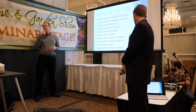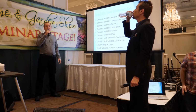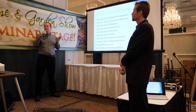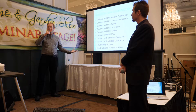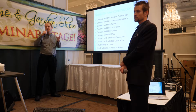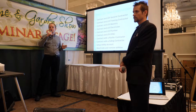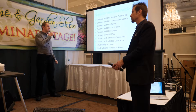Yeah, and sometimes what you'll run into with utilities, especially if you're doing this in the winter months, and we actually ran into this, where ComEd was supposed to come and connect the electricity at a house, and that big storm that came in November hit right on the week that they were going to come and hook up the electric at a job site. Well, they said, too bad, we're coming in 2 weeks now, because of how many people lost power, so their focus became getting everyone connected with electricity. So sometimes the weather will affect that timeline, so you want to get all that set up as quick as possible, because it usually takes them 2 to 4 weeks, once you approve it, to come out and disconnect.